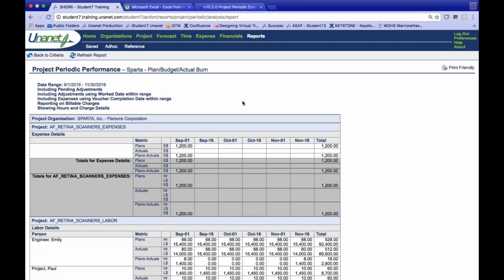And accommodate for vacation time too. This could be done if I were planning with an FTE. You know, typically an FTE might be 92% of the time and not fully 100% of the time, for an FTE, or full-time equivalent, for my people, for my TBDs, and actually my named resources here.